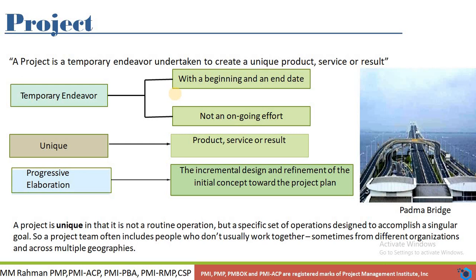The output of the project is always unique. Another characteristic of the project is progressive elaboration. Progressive elaboration means in the beginning of the project we do high-level planning, because in the initial stage the project scope is at a high level. As we move to the execution phase, the project team knows the detailed activities and we start detail planning.